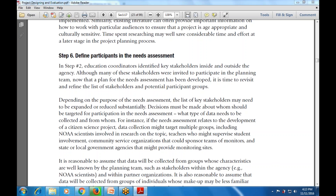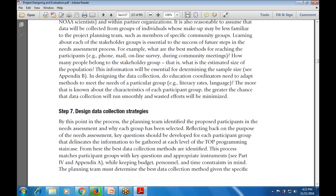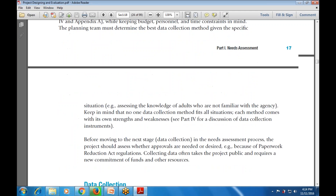The planning phase is done; the next step is to design the data collection strategies - what are the various data collection strategies? At this point, we identify the proposed participants in the need assessment, why each group has been selected, the key questions developed for each participant group, how we are delimiting the process, and what process will be used with the appropriate instruments.